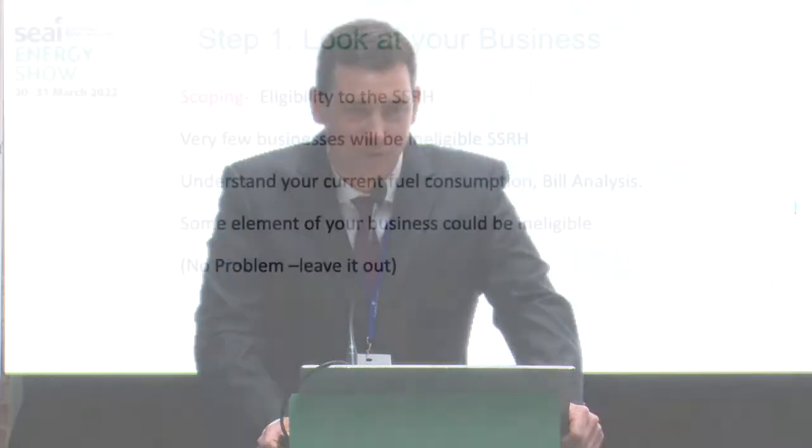Installation is completed, commissioned, a completion report is sent into the SEAI. We'll send out an inspector. Inspector will sign off. Then you're on the payment cycle. Payment cycle, 3 months later, you'll get your first payment from the SSRH. That'll go on for 15 years. Ongoing obligations I'm going to touch on at the very end, but they're not that bad. First steps, starting today.